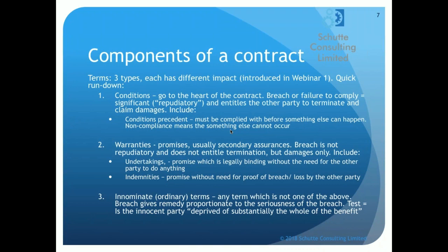If you have a condition which is breached and is repudiatory, that breach will entitle the other party, the innocent party, to terminate that contract and also to claim damages for any loss suffered. There's lots of different types of conditions. You need to look really at what the significance to the contract is of the condition.